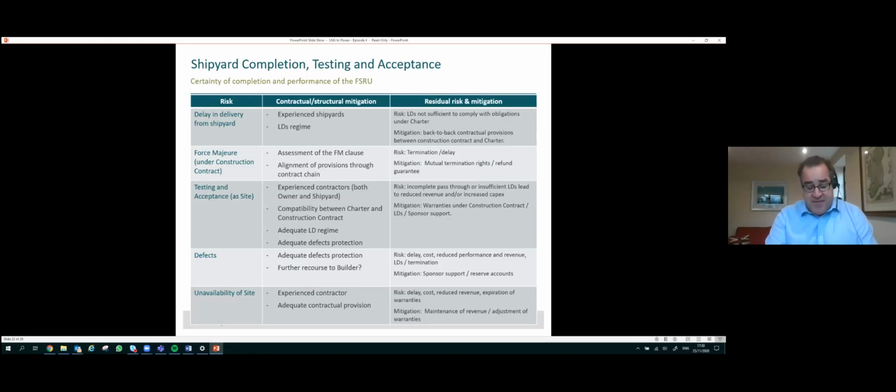However, during the FSRU's construction, there will be various risks that will fall outside of the FSRU sponsor's control, for which the FSRU sponsor will not be willing to accept responsibility. And it will want to ensure that any permissible delays, i.e. for force majeure, that are claimed by the builder under the construction contract will operate to automatically extend the time for delivery under the charter.